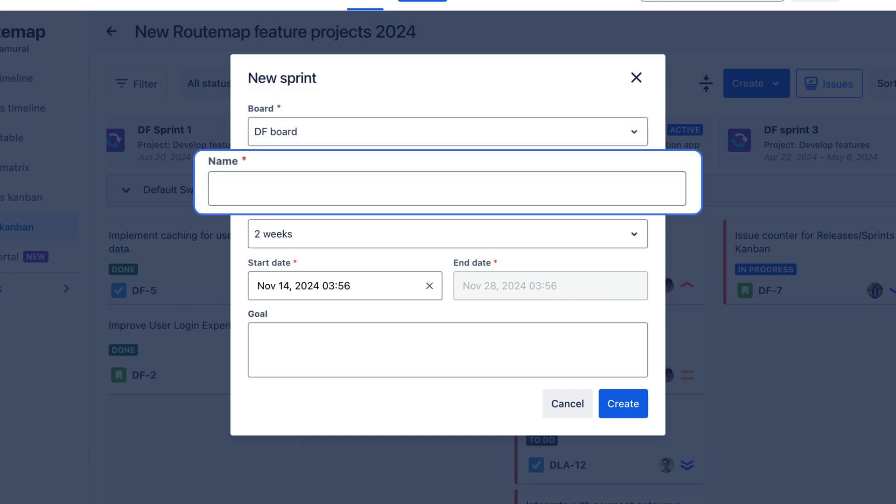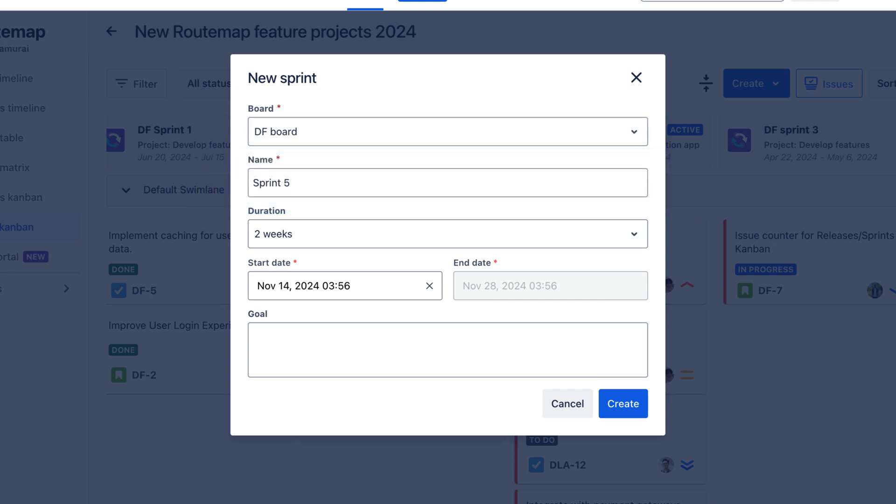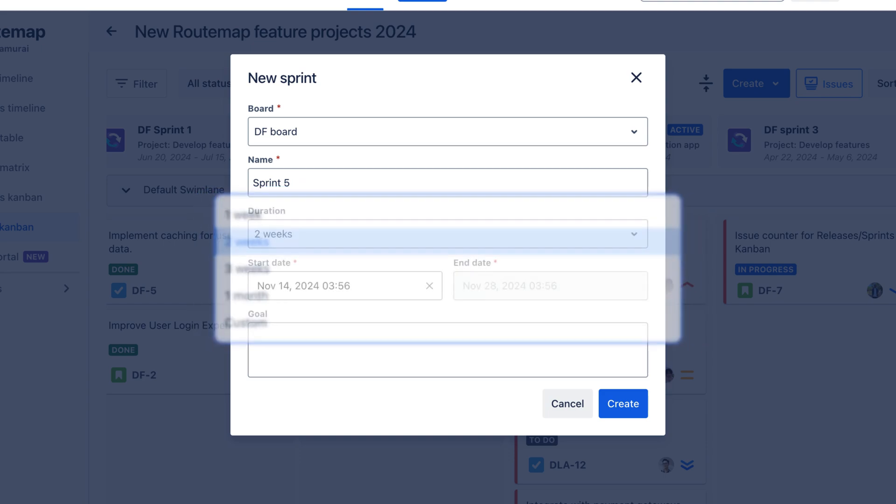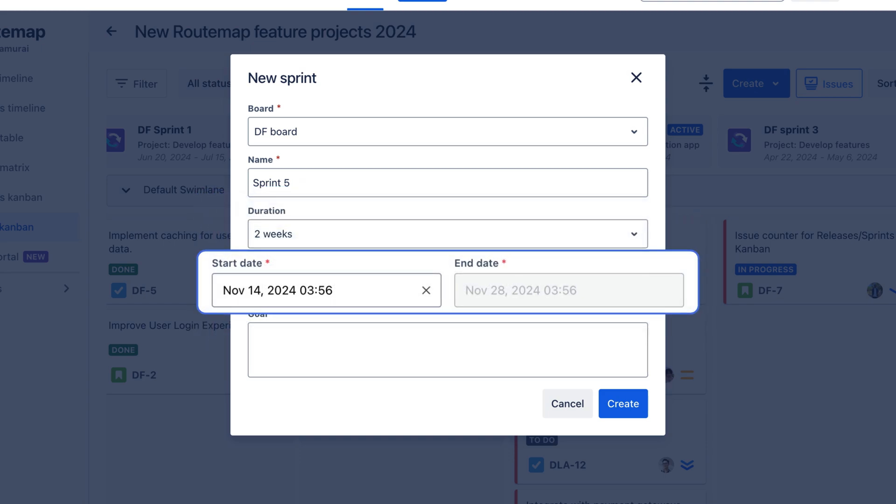Fill in the Sprint's name, selecting the Sprint duration, which can vary from two weeks to one month. You can also create a new duration to suit your needs. Next, choose the start date of the sprint.